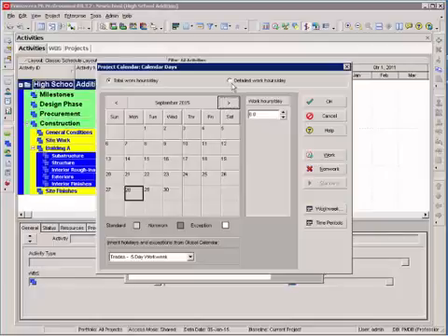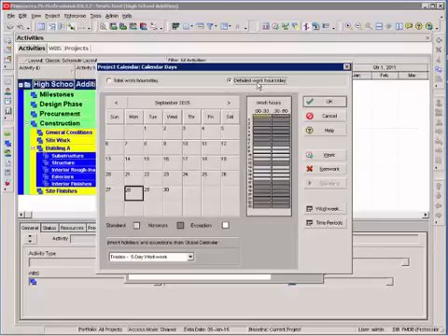You'll have more problems with activities and schedules if you don't set your calendars up right. By selecting the details or the work hours, I can select what times of day that these calendars will count. This is where you need to be very careful. If I show one activity assigned to a calendar that finishes at 4 in the afternoon, and its successor is assigned to a different calendar that works till 5, that successor will show starting the same day that this activity finishes.